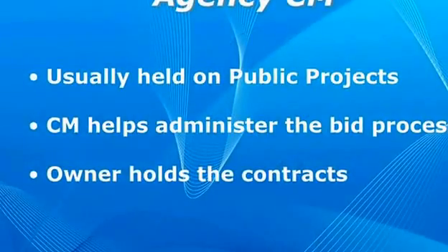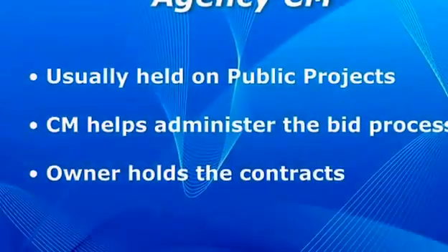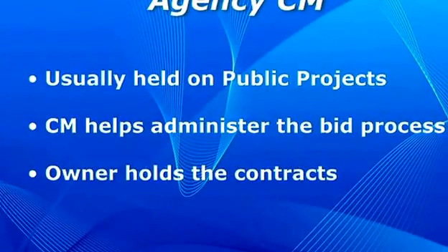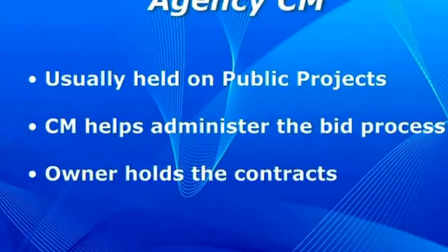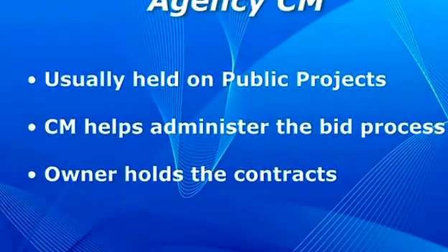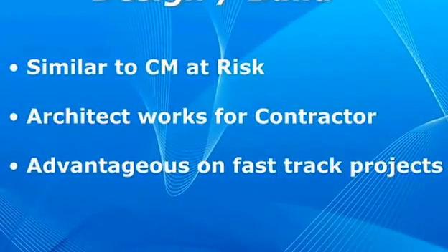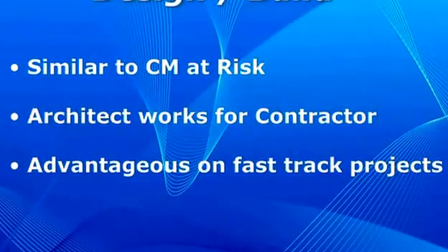Agency CM is a delivery model in which the construction manager or general contractor would take the documents and administer the management process, but not necessarily hold the contracts. You see a lot of this relating to municipalities, in which the owner will hold the prime contract, and then you'll have a CM on board that will administer that process, and they'll also help administer the bidding process as well.